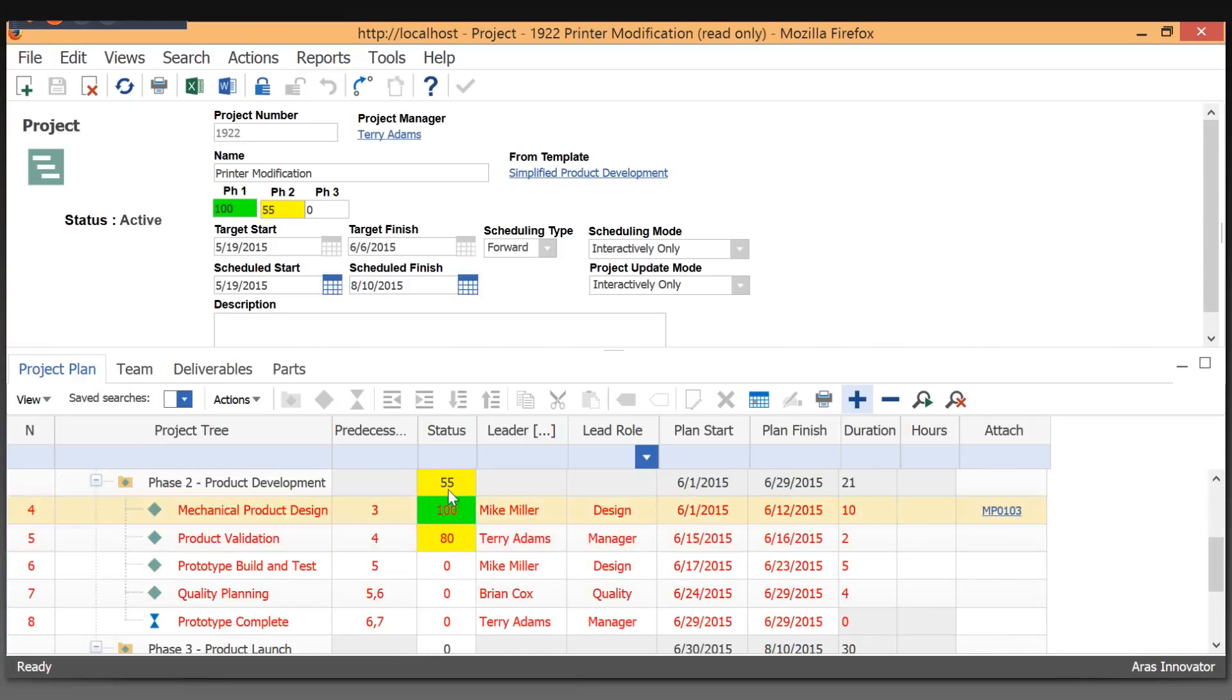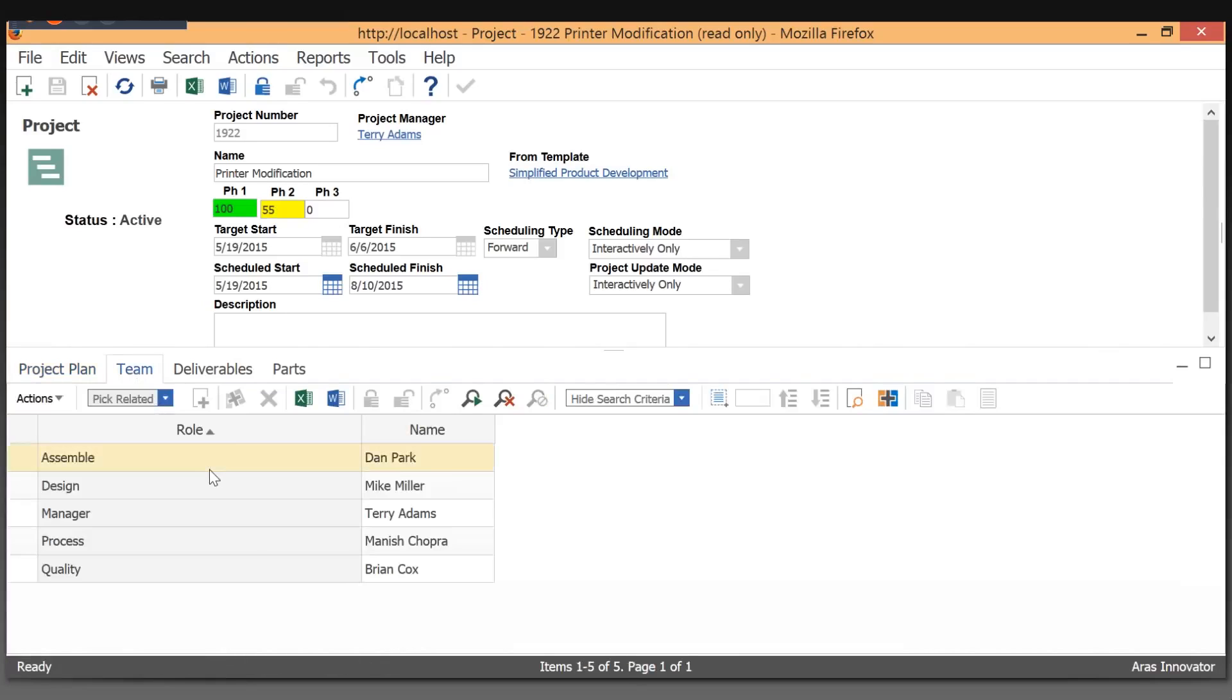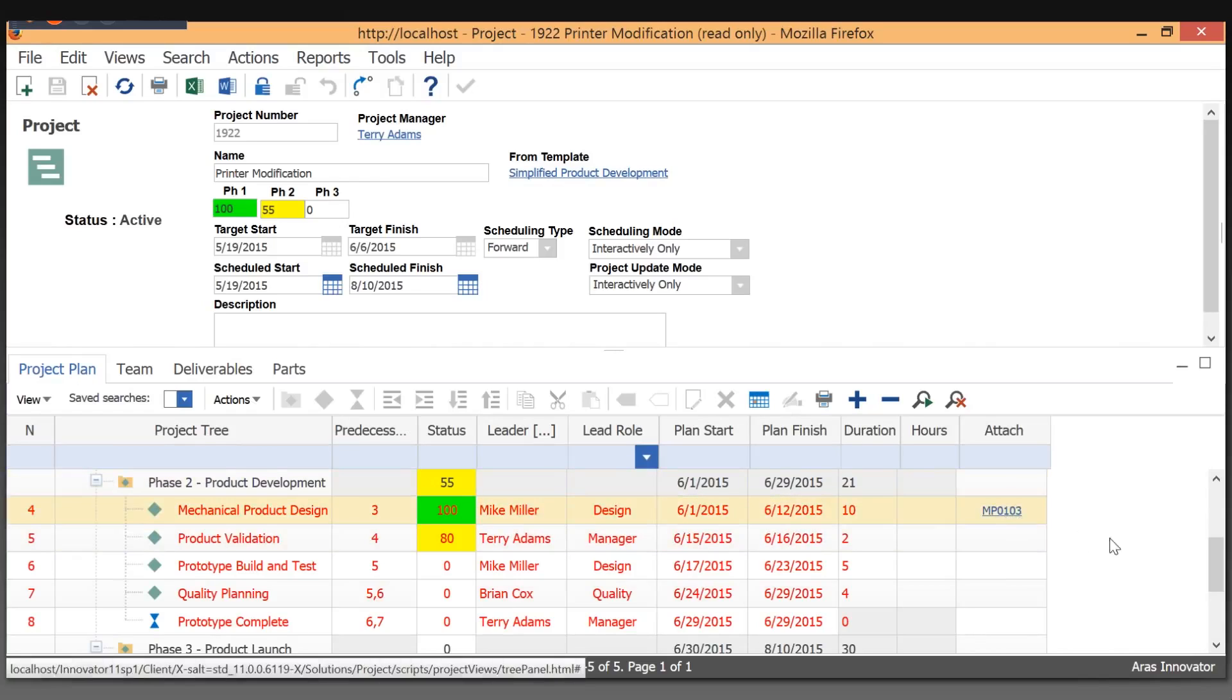The calculation of the percent complete on the phases is done automatically. We also have a team concept for the projects with roles. When we use a project template to create a project, we add users to the roles, which automatically fills in the project plan. As people progress through the project, they attach the actual deliverables.